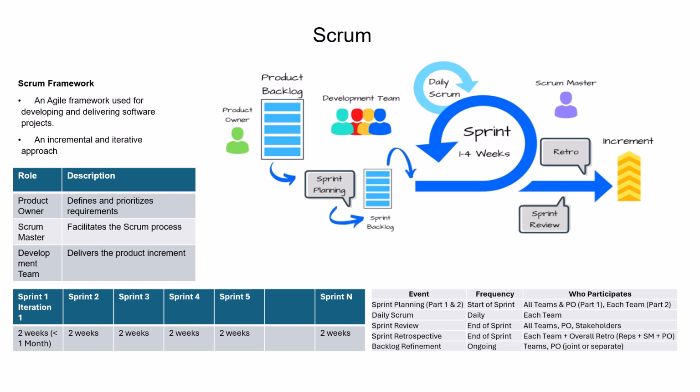If you look in the actual diagram here, in the drawing, you see the product owner, there is a product backlog. Product backlog is the requirements. So this is a list where the product owner works with the customer, and they define the requirements and put them in the backlog, and they prioritize them, which one needs to be done first and second, etc.